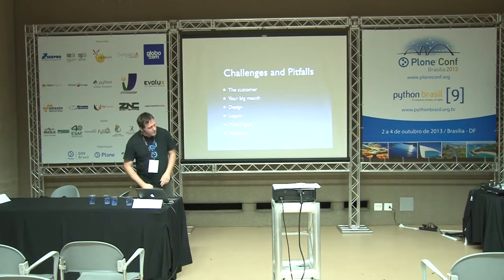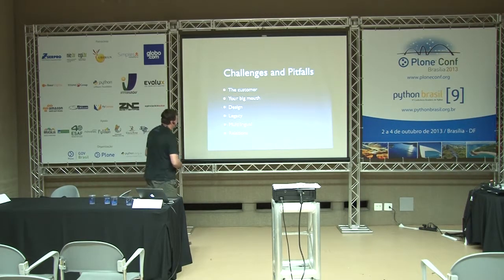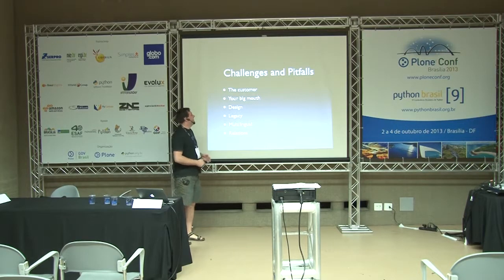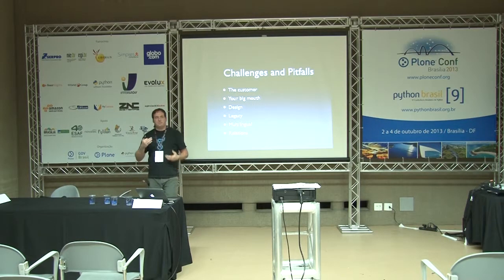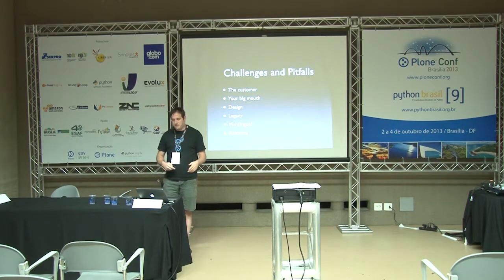Another problem, or more a challenge, is the legacy stuff. So if you have old databases, old content that cannot really be migrated, that is problematic, that is pulled from somewhere, use Diazo or Deliverance, and Cordon, just isolate this stuff and pull it in via Diazo or Deliverance. You save a lot of time and the customer saves a lot of money there.